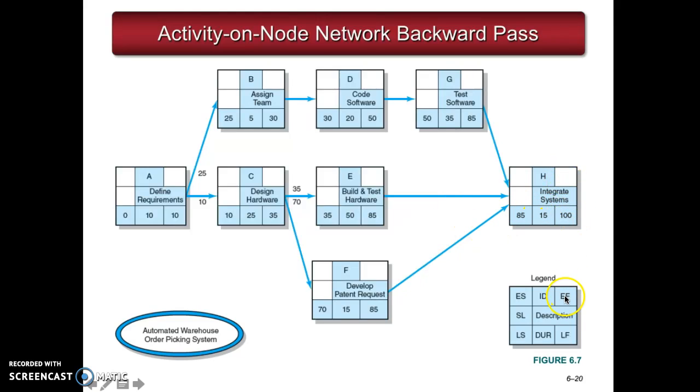So what you have was early finish 100 days. You move it over because it's the final node, so the early finish becomes your late finish day. Remember, when you did forward path, you used addition. Now you're using subtraction. So 100 minus 15 becomes 85, and 85 will be carried over and become the late finish date of all its preceding activities. They become 85, 85, 85.